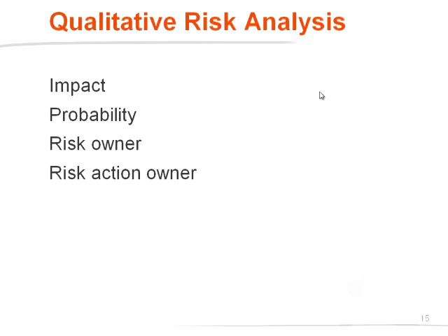And the risk owner is the guy who is really accountable for the overall risk. And if you have a risk owner for every very little risk, that's not good. So you should choose for which risks you have an owner and an action owner. And that also implies that you should drop very simple risks and focus on the big risks.